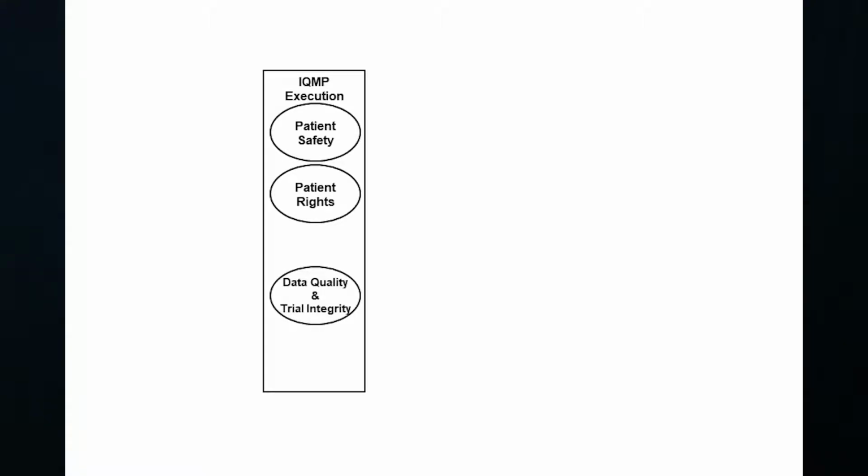In clinical trials, it is common to create and execute an Integrated Quality Management Plan, or IQMP. The IQMP addresses 4 elements of quality relating to patient safety, patient rights, data quality and trial integrity, and compliance to plan. Clinical trial project leaders must manage for budget, schedule, and quality with respect to these 4 elements.